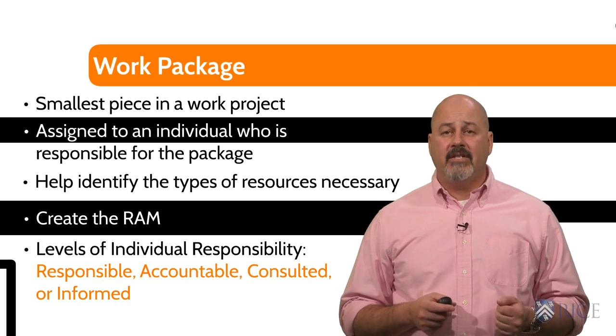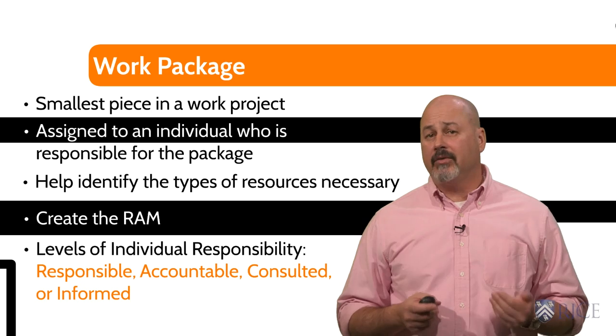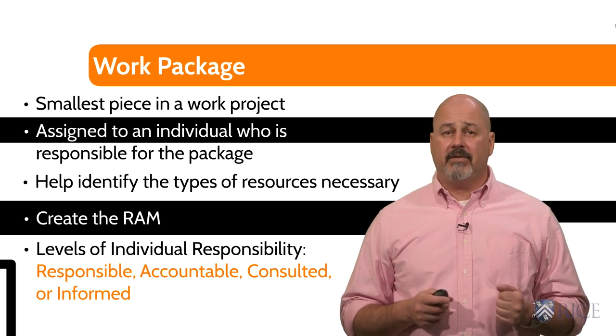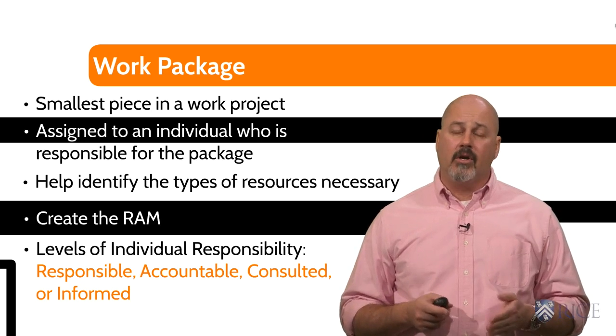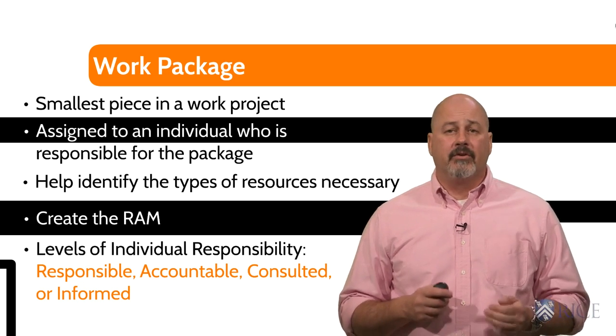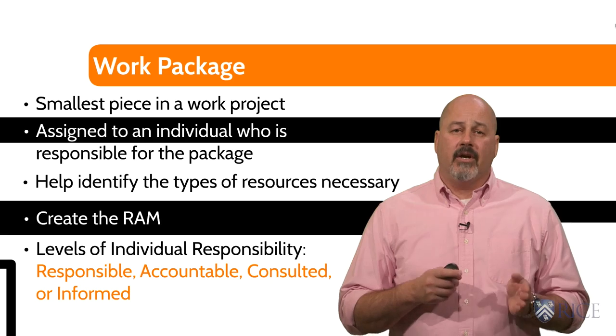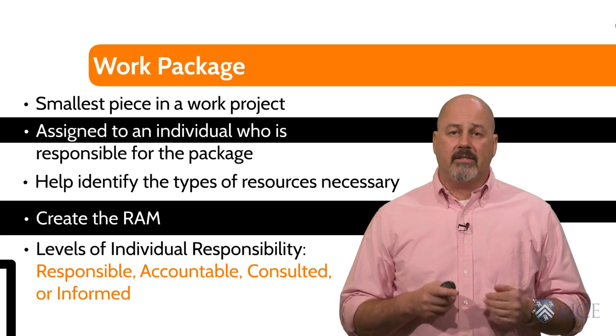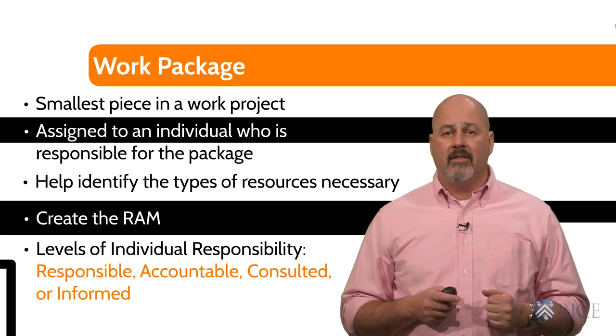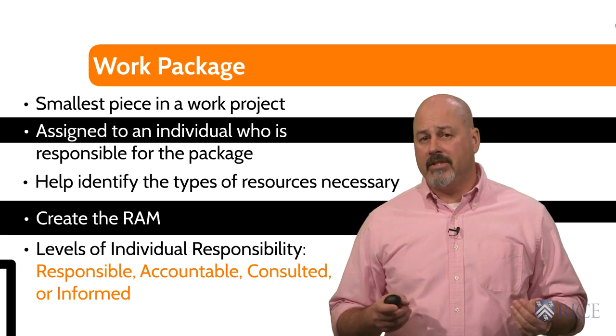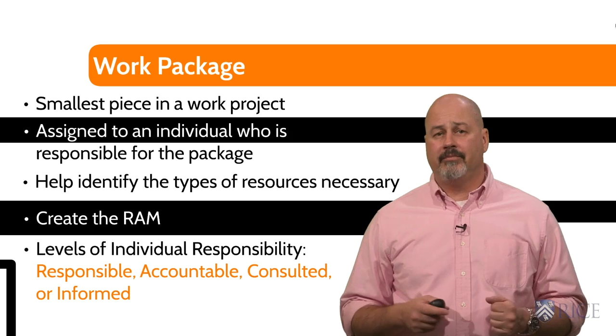Work packages help identify the types of resources necessary to complete the project, and they should be specific enough to help the person doing the work complete the work. If the resources aren't associated or identified in your WBS, it doesn't provide enough detail. That being said, you don't want to provide too much detail, just enough to get things done.